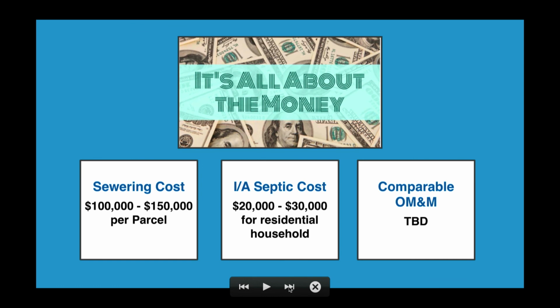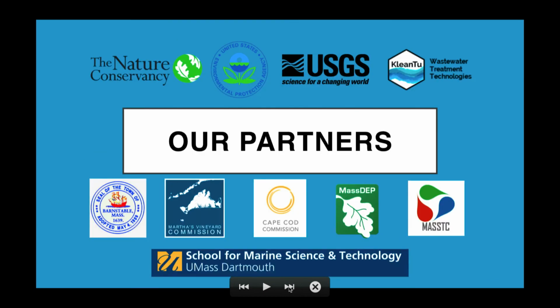Sewering is very expensive. $100,000 to $150,000 per parcel is the cost, really almost no matter where you look. Now that's the all-in money. That's not reaching into your pocket, but it is reaching into your tax contribution, individual contribution, money that's being borrowed from the state or the federal government. We're working on alternative septic systems that cost between $20,000 and $30,000. They can be retrofit into an existing Title V system for about $20,000. Let's go to the next slide.